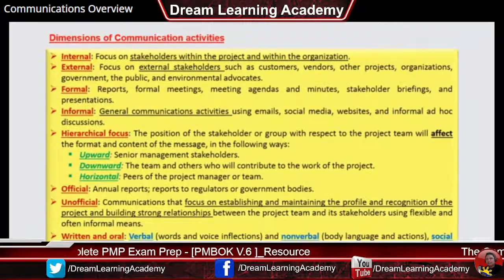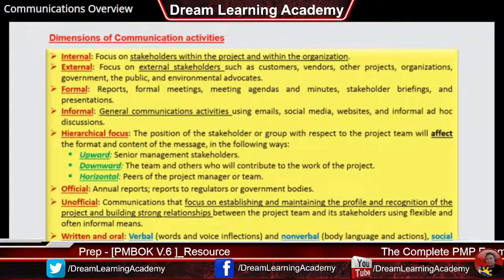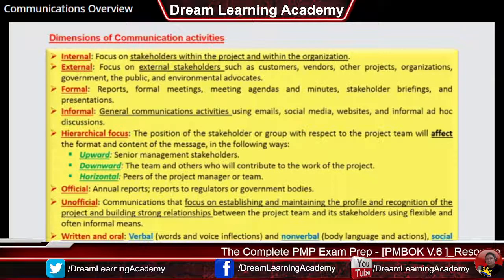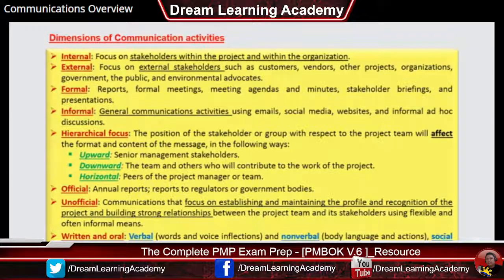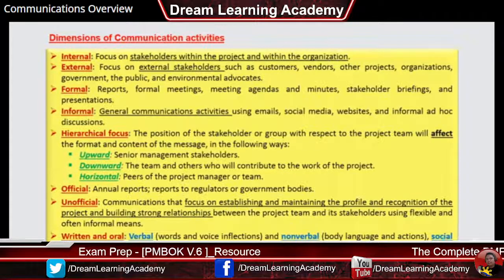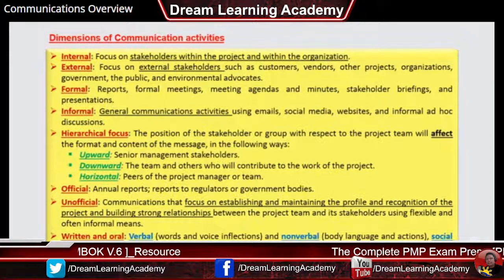There are eight dimensions of communication activities. The first is internal, focusing on stakeholders within the project and organization. External focuses on stakeholders such as customers, vendors, other projects, organizations, government, and the public. Formal includes reports, formal meetings, and presentations. Informal covers general communications using emails, social media, websites, and informal ad hoc discussions.